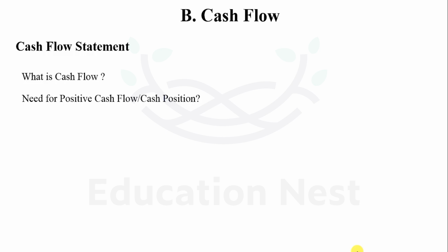You need to have a positive cash flow to make sure that you are not facing a cash crunch, so that your entire team or project is not under pressure to complete early in order to recover cash from the customers. Most of the time projects are based on deliverables, and when you have to rush the deliverables, there is a great chance of a compromise on quality. So more than the financial aspect, positive cash flow gives the project manager peace of mind that the project is heading on the right track.